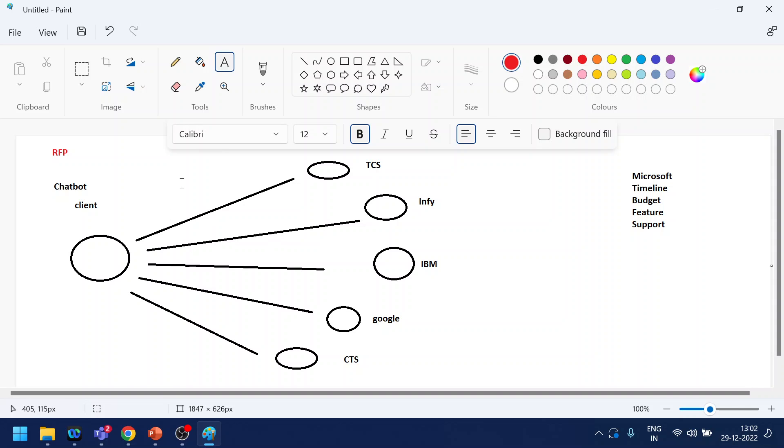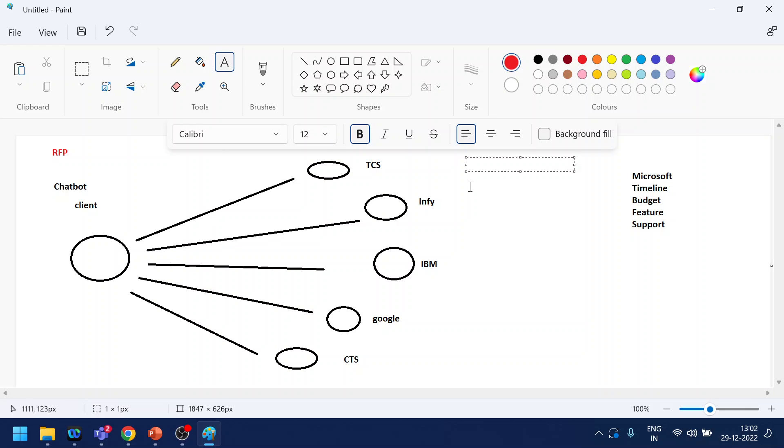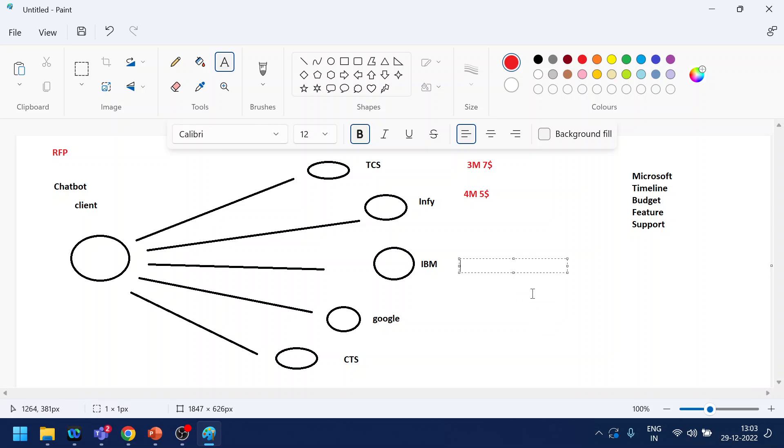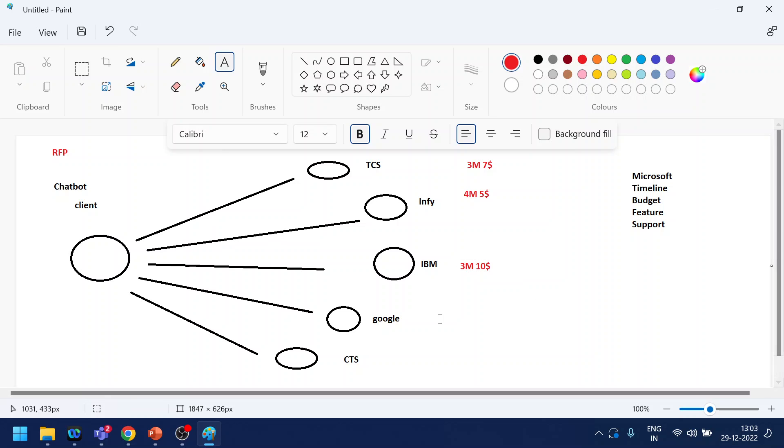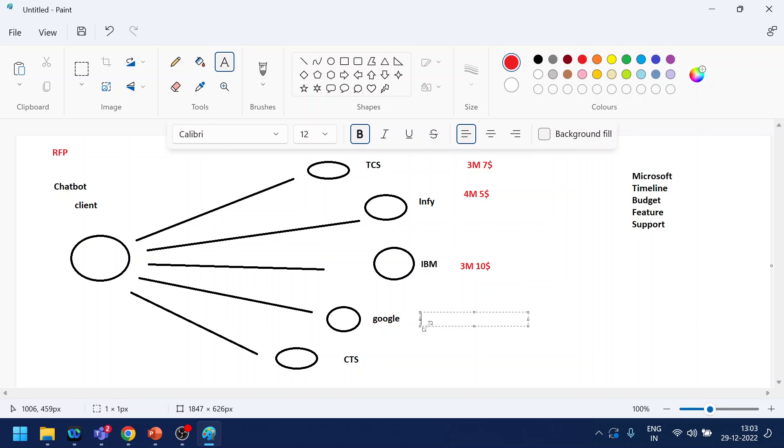Once you go to these various companies, they respond. Let's say TCS says I can do it in three months and in seven million dollars. Infosys says we can do it in four months but our costing is five million dollars. IBM says we can also do it in three months, not a big deal, and ours is less than ten million dollars. Google says we already have a product, why go with Microsoft, so we can't do it, so it will say not applicable, we have our own chatbot framework. That's also a proper response. And there's Cognizant which will say we can do it in three months and we can do it in let's say six million.